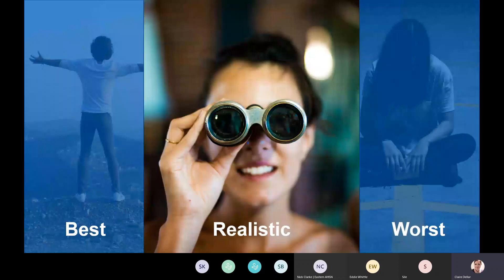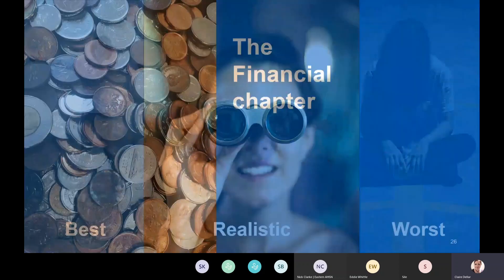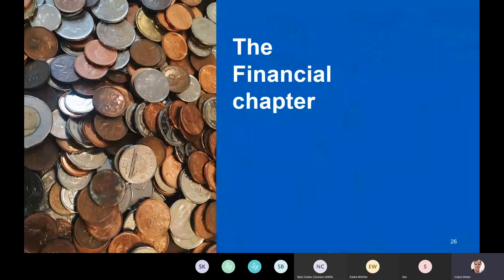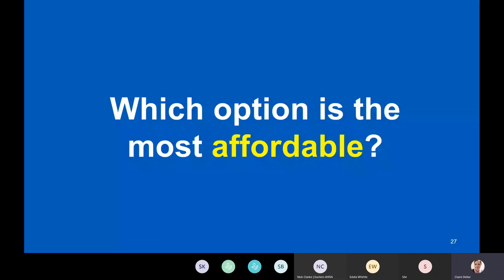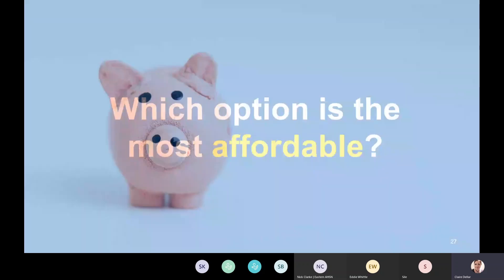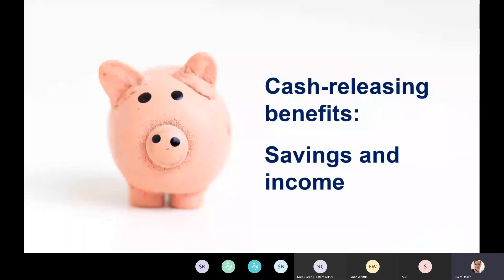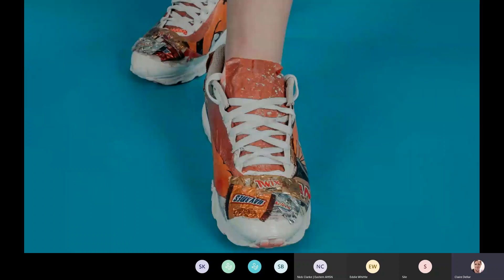The financial chapter asks: which option is most affordable, and how am I going to pay for this? You might think it's just about funding sources and negotiations with commissioners — and yes, it is — but it's also about cash-releasing benefits, meaning savings and income: selling off a building, reducing running costs, using less electricity through solar panels, or travelling less because you're using Skype more.